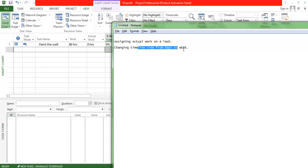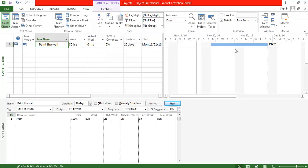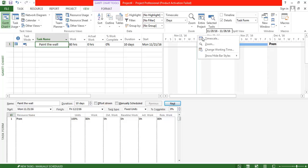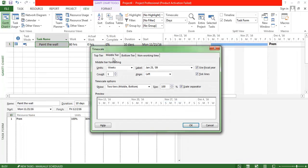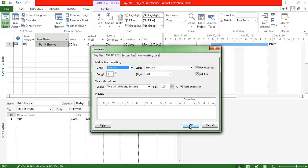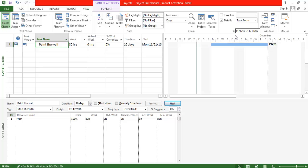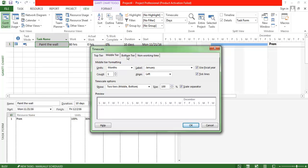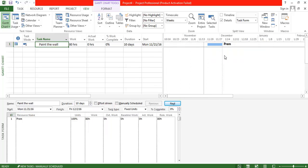Currently no work has been completed for this task. Now let's understand how to convert the timeline from days to weeks. By default it shows days from Monday to Friday. I want each full week as one column. Go to the timescale, right-click, and under the middle tier change weeks to months. Then go to the bottom tier and change days to weeks. Now two weeks are shown in a shaded format — simple and easy to view.